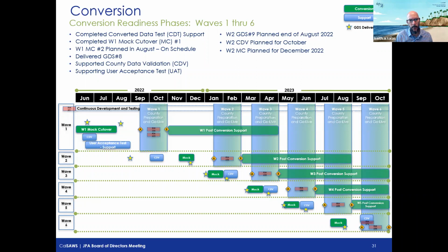And so we executed that this past June. As Arnold mentioned, we've revised our baseline down to 87. We have some very distinct mitigation steps that we believe when we execute mock cutover number 2, we will then be in the 84-hour window. So I'm very confident that we will be there. What mock cutover 1 resulted for us was golden data set number 8.